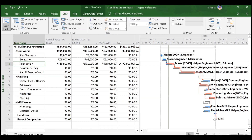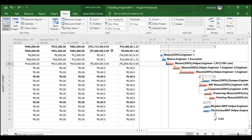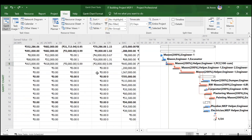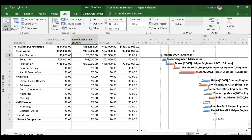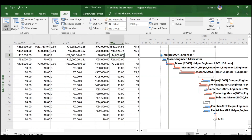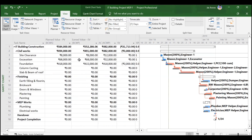SPI (EV ÷ PV): for the first two completed activities SPI = 1. For foundation, dividing ₹4,15,000 by ₹4,18,000 gives an SPI slightly below 1 — about 1% behind schedule. For Cost Variance (CV = EV − AC): site clearance has EV = ₹8,000 and AC = ₹12,000, giving CV = −₹4,000, indicating cost overrun. Excavation has EV = ₹68,000 and AC = ₹52,000, giving CV = +₹16,000 — a cost saving of ₹16,000.